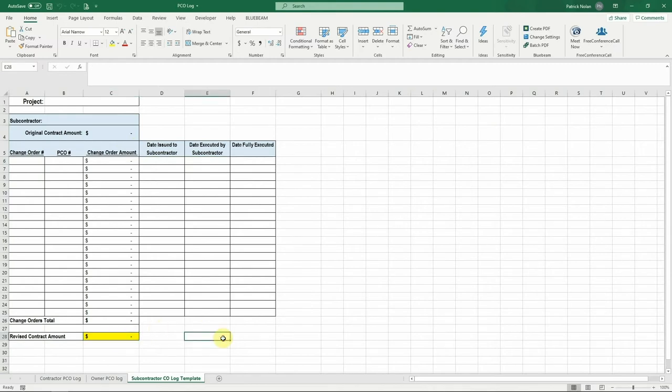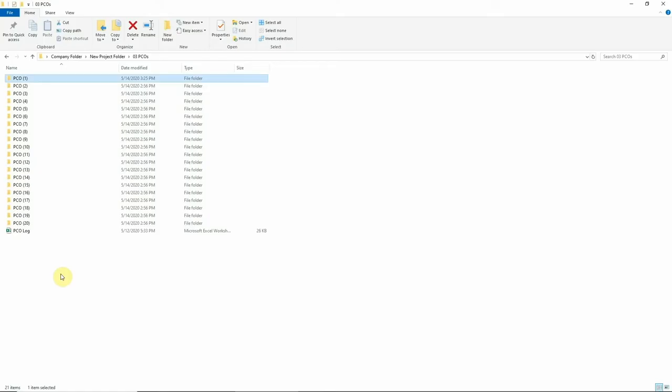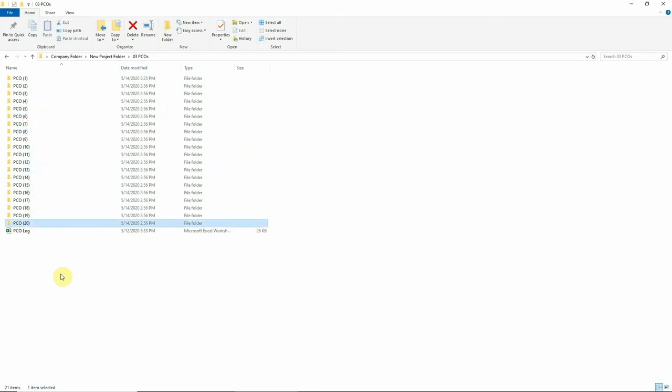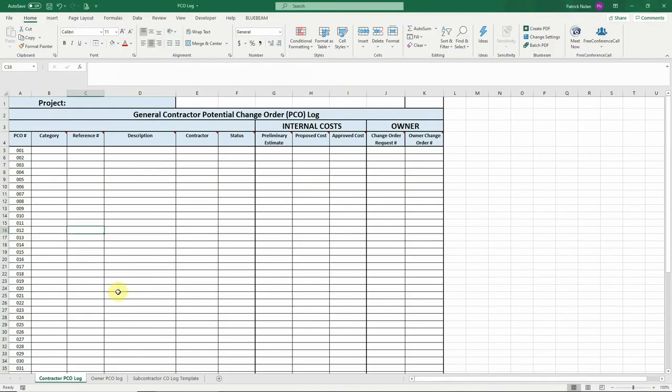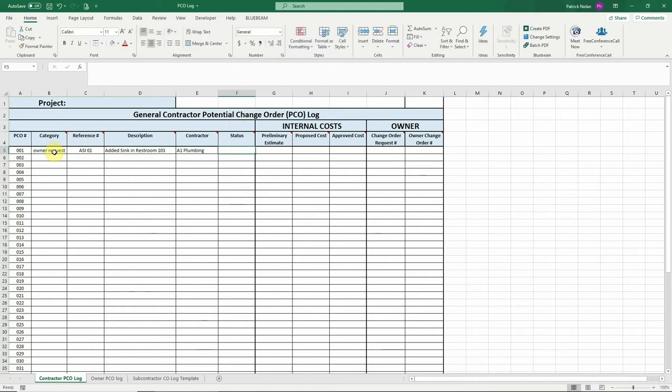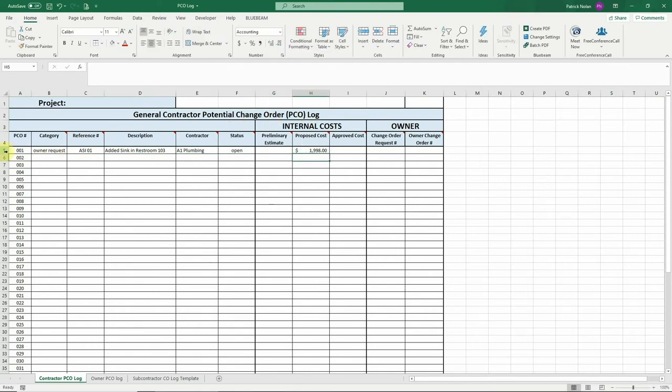Let's talk about the process. When you encounter any issue on the project that may result in a change order, you will create a new potential change order or PCO. Open the PCO log and use the next available PCO number. Then enter the category, reference number, description, contractor name, status, and then any preliminary or actual cost estimates that you have for this PCO.